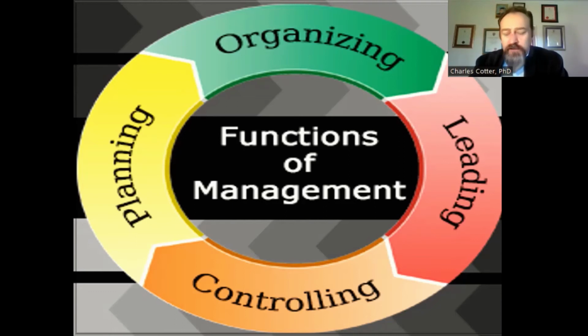The third pivot that we need to talk about, of course, is scheduling and sequencing. So your plan will typically just include a target date. So sub-task 2 needs to be completed within 3 months, but within that 3-month time period, we don't specify the sequencing of tasks. So we know that certain tasks have to be performed. There are predecessors, there are successors. So we need to coordinate and we need to pinpoint the scheduling and sequencing.